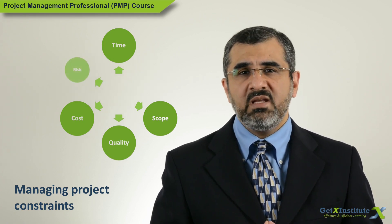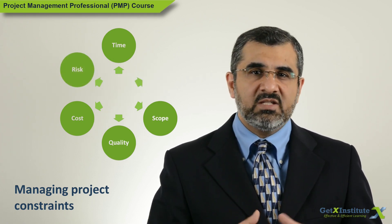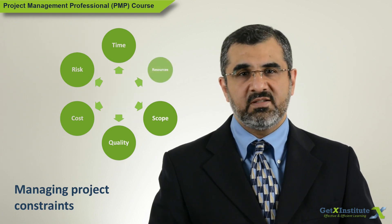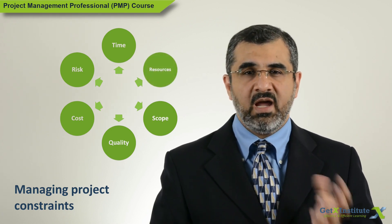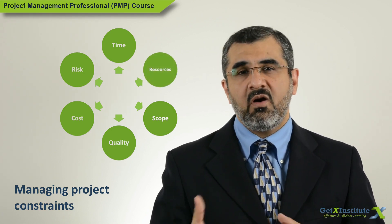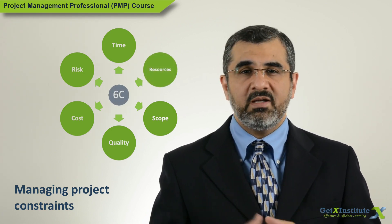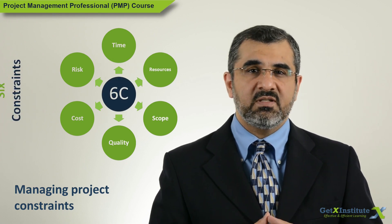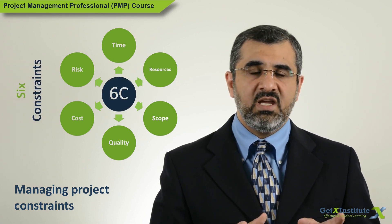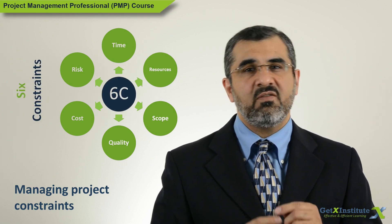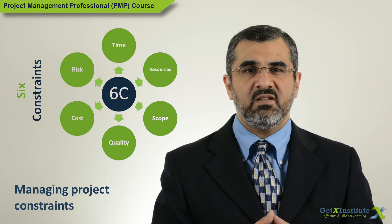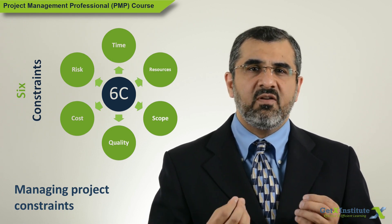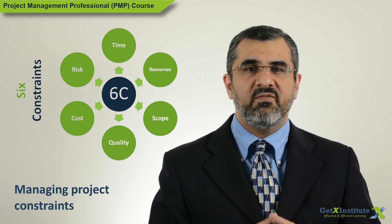That means the triple constraints actually are six constraints: time, cost, scope, quality, risk, and resources. A change to one requires a change to at least one other, but usually several of the other five factors.